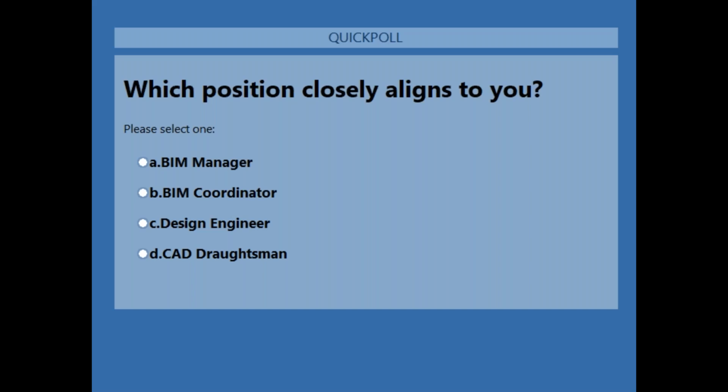Are the templates available as default, or do you have to start from scratch? If it is a project template, there are no such default project templates here. Let's say I'm starting a new project on BIM 360 Cloud, where I'll be setting up the folder structure, permissions, and adding some checklists. If I want to use the same setup for another new project, I can copy that standard to the new one. That is the option available.